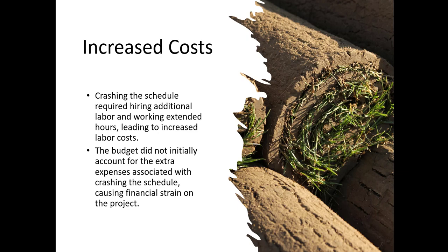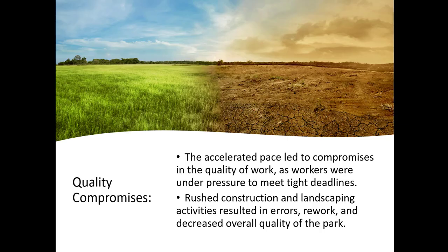Crashing the schedule required hiring additional labor and working extended hours, leading to increased labor costs. The budget did not initially account for the extra expenses associated with crashing the schedule, causing financial strain on the project. So one negative about crashing is we had an increased cost: we have more people involved, and we're going to be doing overtime, which usually is an additional cost. So this was an unexpected amount.